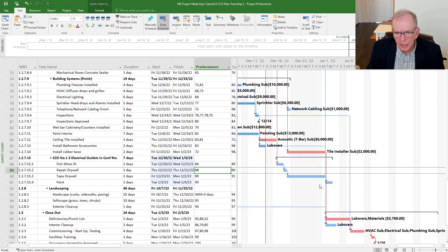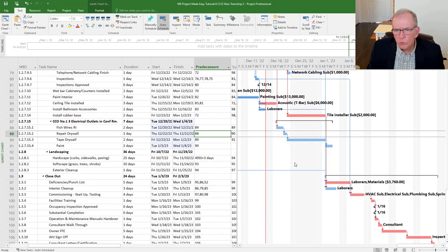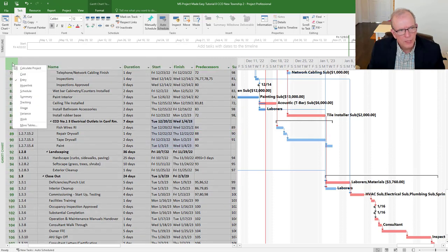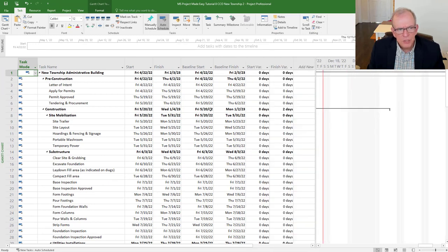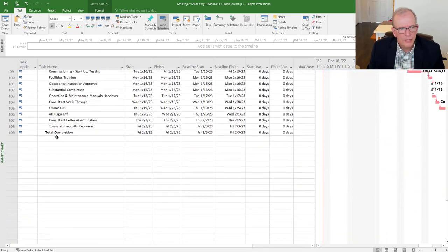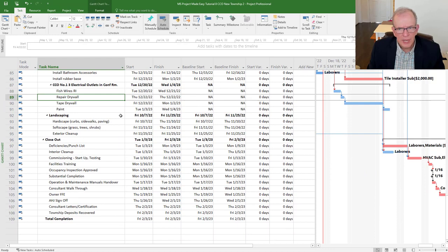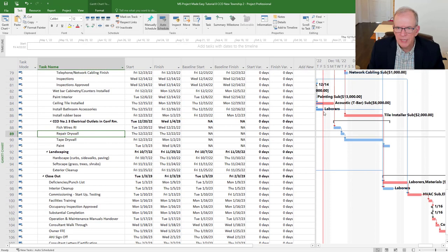If this is sitting here right now and you wonder how it's affecting my project, well, I would go to the variance screen. And if you look at the other videos, you switch between screens very easily. You right click, you click the square icon box, right click, go to the variance screen. And I should be able to see if there's any variance on the project. And you see here, it's not showing any variance. Not showing any variance at all the way down. Here is my change. So that means my project's been up to date, up to the status date. It didn't have any variance.